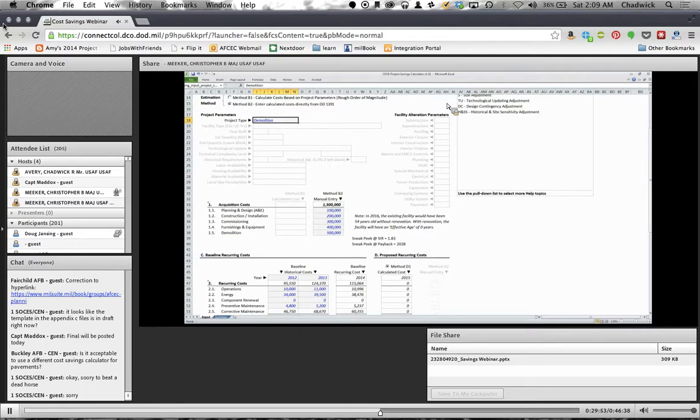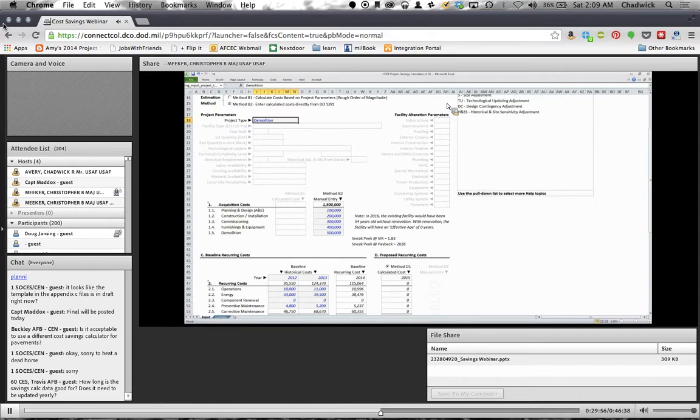How we will identify the savings ones are essentially those requirements with an SIR greater than 1. We're going to look for those specifically. Now, if it's a really good project risk-wise and has a high SIR, we obviously wouldn't pull that out because it's going to score well on its own. But for those lower risk projects on the lower left, if you remember that quadrant we showed, those are the ones we're going to identify that have the big bubbles and a high SIR. But every single requirement out there should have a POF score and a COF score.